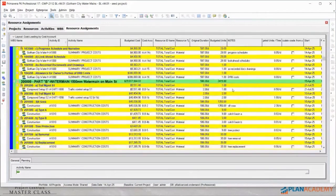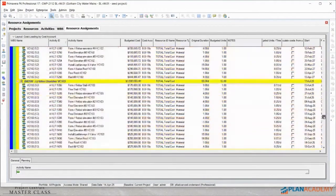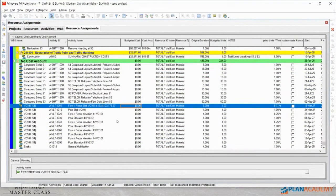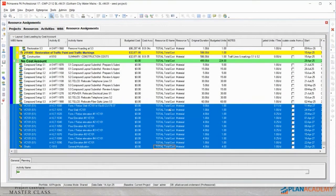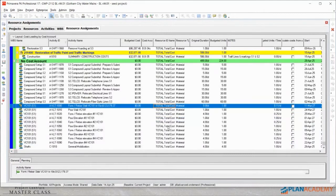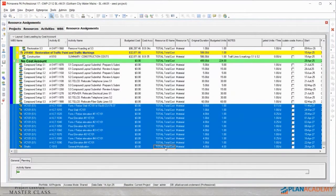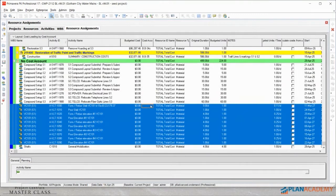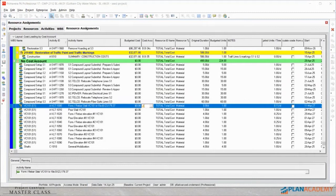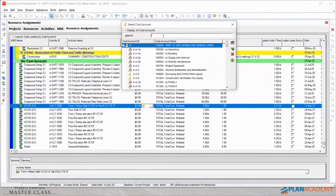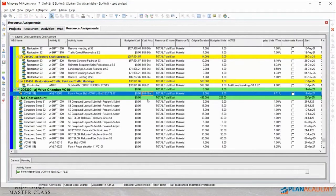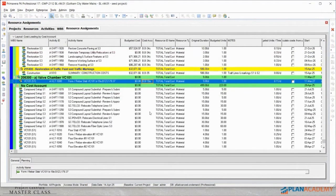Let me show you how easy it is to work with the resource assignment screen. We'll actually cost load a piece of work here because I removed it, and I'll show you how easy it is to put it on. It's really easy to fill down a resource assignment — you can just fill down this total cost resource assignment across a bunch of activities. I'm focused on these AVLT activities here — this is a vault installation. Similarly, you can fill down a cost account, so my cost account is B-19A. I assign it to the top, and because I'm grouping by cost account, it moved up into this group, but I can still fill down.